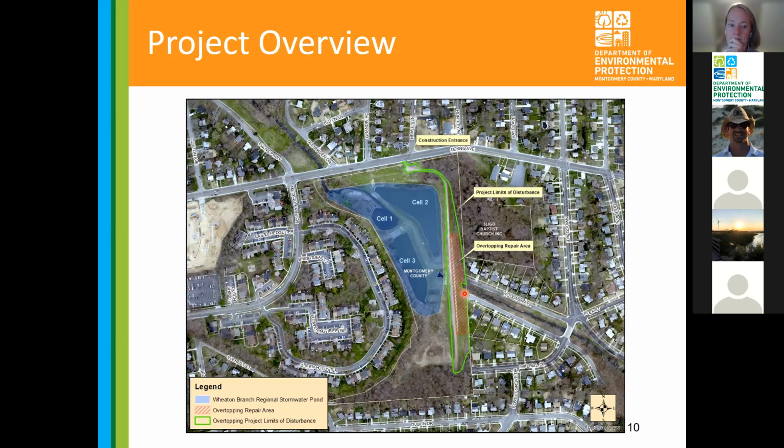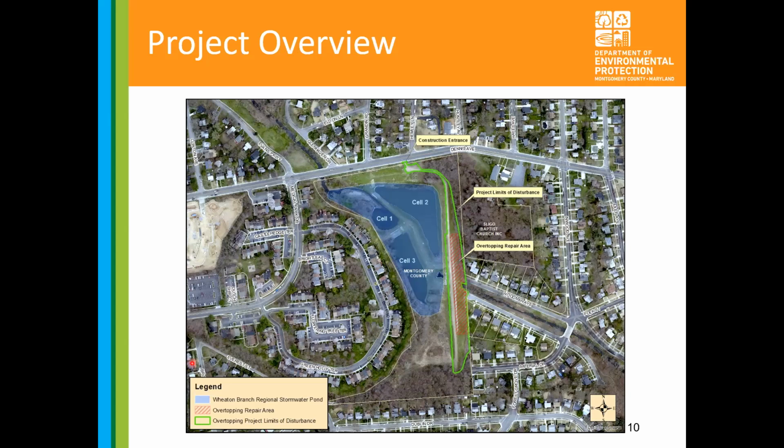Oh yeah, it'll be replanted. We're going to replant it with vegetation. And like Doug had said, we're proposing to use a meadow mix on top of the dam. But we can't replant the woody vegetation. So no woodies, no shrubs, things like that, no trees. That's absolutely right, and forgive me, that was an oversight on my part. Yeah, that's a big no around dams, Peg.